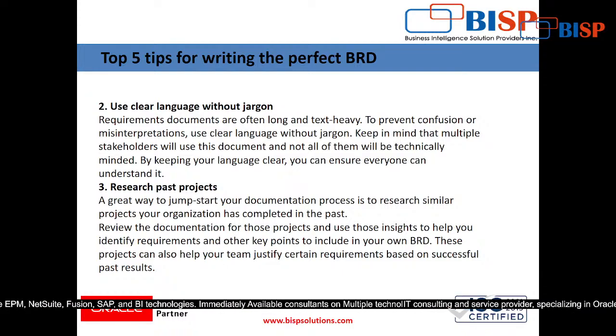There should be a standard format, right? And secondly, research past projects means whatever you have written in your past projects, or whatever format you have used, which was very user friendly. So you should be able to write a proper BRD. The great way to jump start your document process is to research similar projects your organization has completed in the past. Review the documentation for those projects and use those insights to help you identify requirements and other key points to include in your BRD.